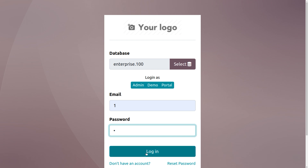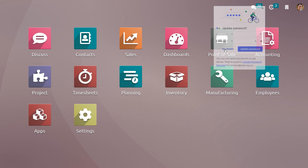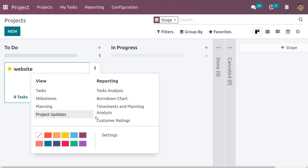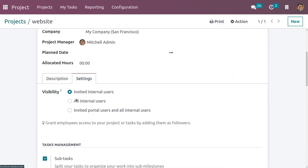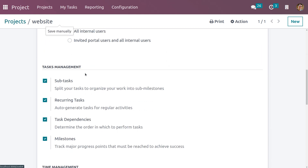Now let me log out from Deco Addict and log in as project manager Michelle Admin. Let's get into the project module. Under Settings, we can change the visibility. Let's set it as 'All Internal Users'. If you set the visibility as All Internal Users, then whether they are a follower or non-follower, they can access the project. Let me save the changes.